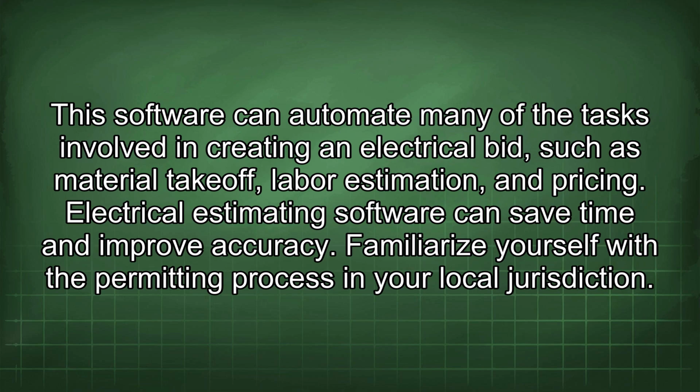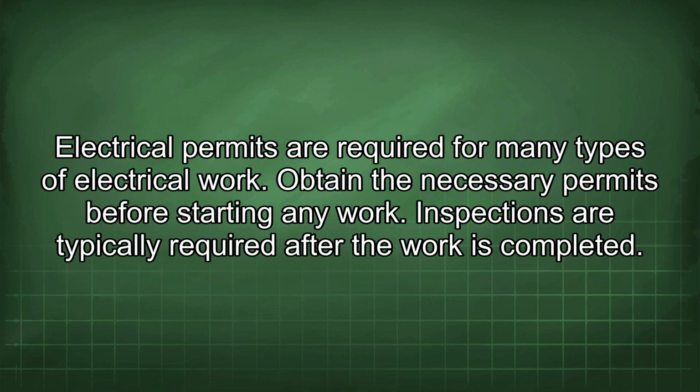Familiarize yourself with the permitting process in your local jurisdiction. Electrical permits are required for many types of electrical work. Obtain the necessary permits before starting any work. Inspections are typically required after the work is completed.